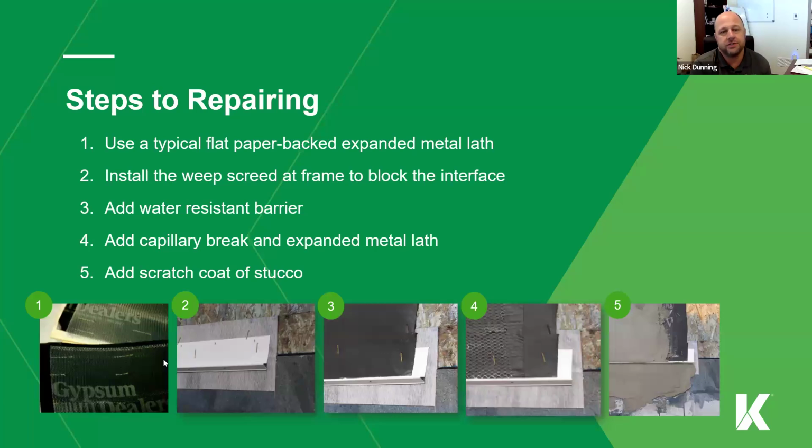But without that additional help, you can really get steered in the wrong direction and have a lot of issues. And a lot of these things, you close them up, they look fine. It's 5, 6, 7 years later that you really start seeing the damage. And at that point, a lot of warranties are gone. Statute of repose has been reduced to 7 from 10 years. A lot of things have changed where you really want that third party looking out for you.